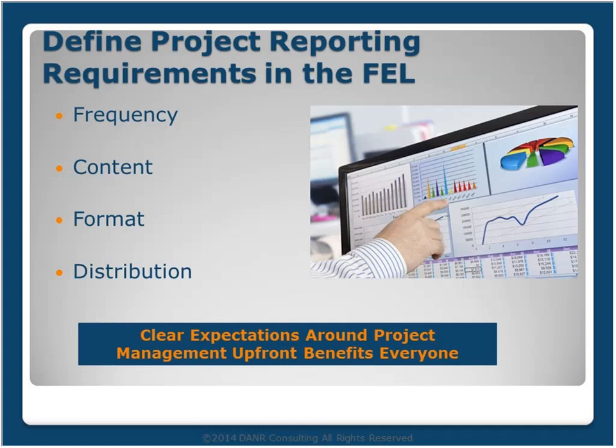I know that many system integrators just use a blanket 10 or 15% of project costs for project management budgets. And there's nothing wrong with this approach, but it's still important to ensure that everyone has the same expectation of what's going to be provided for that 10 or 15%. So don't shortchange project management definition in your FEL. You want to try to define clearly what's going to be done as part of your project management activities.